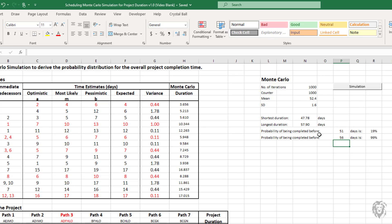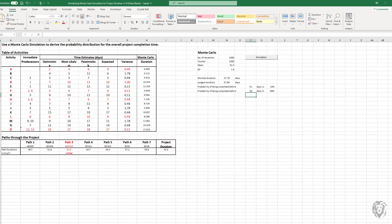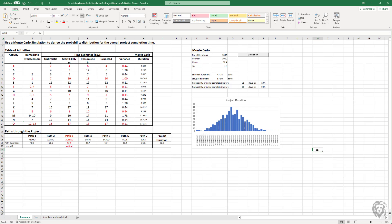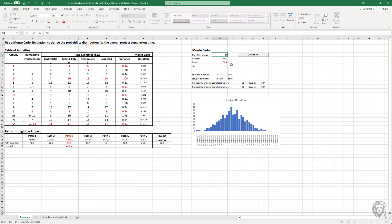The other thing I want to do is I just want to add a histogram that shows you the distribution of the project durations through the Monte Carlo simulation. So let me just go get that and I'm just going to plop it in here. Okay, so I've just used the histogram function. I've put it in there. I've adjusted my baskets a little bit so that I get a meaningful thing. And of course, this is always a great visual check to see have we done a reasonable number of iterations to get a good answer. So we've been using 1000 up until now.